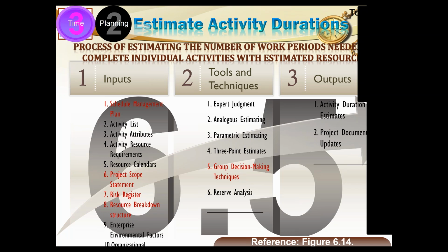So I have 3 figures, 3 points: one optimistic view, one pessimistic view, and one average view, which is coming from most of the people. So I apply statistics on these 3 figures and I take a weighted average. I don't take a simple average, because if I take a simple average of these three figures, then the opinion of most of the people would take the same value as that of the optimist or pessimist. But I know and I understand that most of the people carry more weightage.